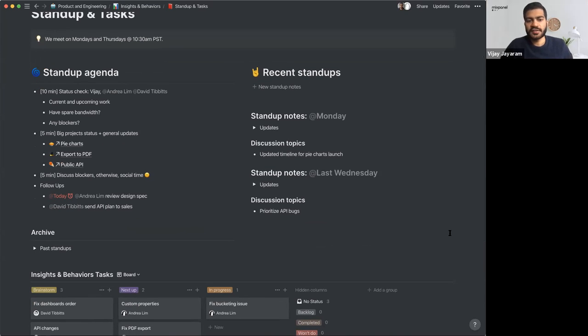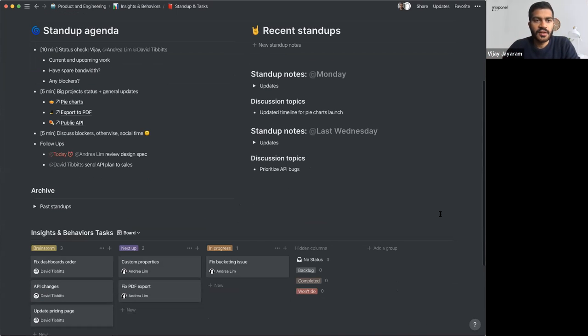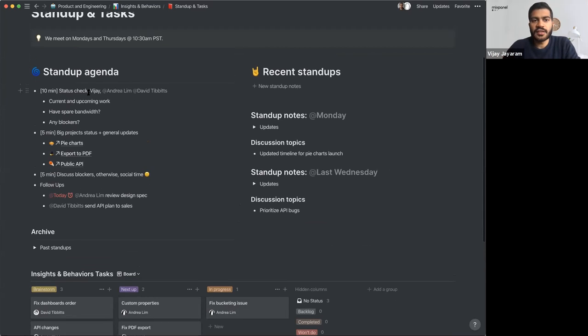So this is more of, a couple times a week, our team meets for stand up. And again, I think this is our team's workflow. Not every team in Mixpanel uses this exact thing. Everybody has their own custom setup, but I think it's directionally similar. So the main idea is each stand up has a standing fixed agenda, and in each one somebody is taking notes about the updates for that stand up, what tasks are complete or blocked or pending, and any follow-ups.